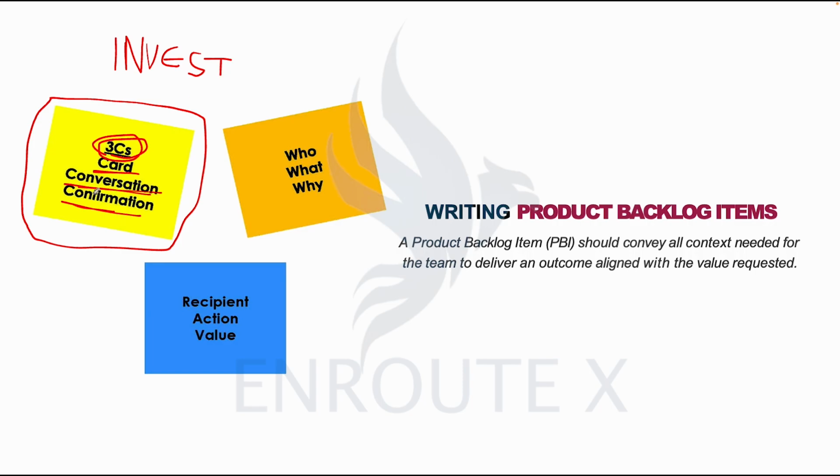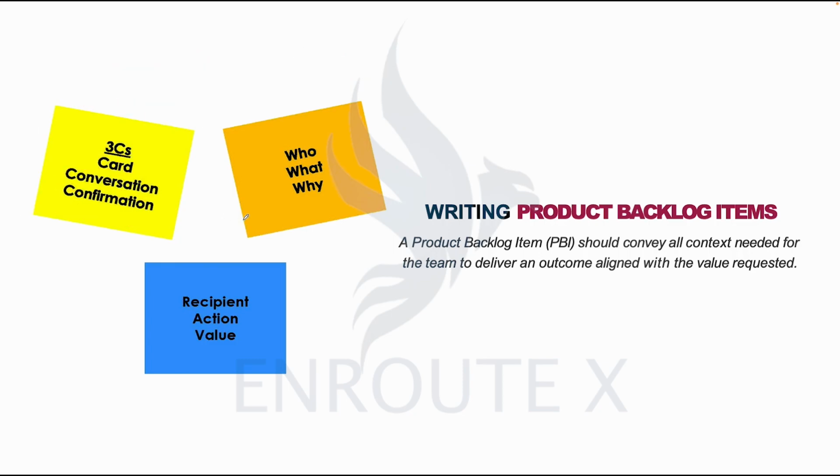So in each sprint planning session, your team has, we expect to see your story represented by the card, the conversation representing the discussion of what needs to be done, and the confirmation representing the clarity, when developers know exactly what they need to do.